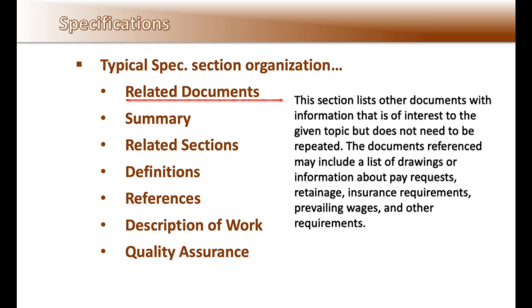Specifications are organized into topics within each section — I call this the anatomy of specifications. It starts with related documents. This section lists all other documents with information of interest to the given topic but does not need to be repeated in every specification division. The documents referenced may include a list of drawings or information about pay requests, retainage, insurance requirements, prevailing wage, or any other project requirements.